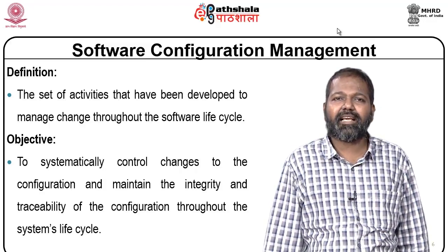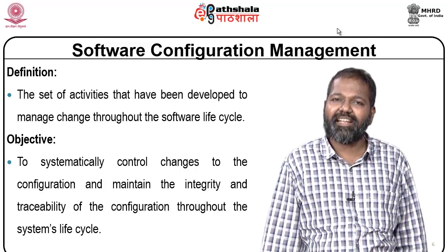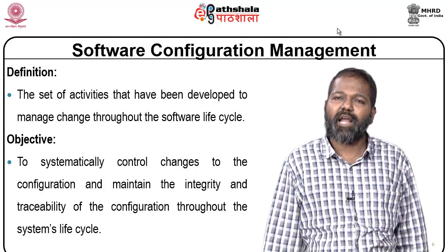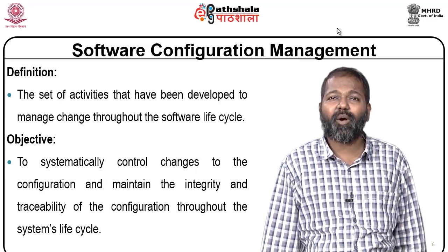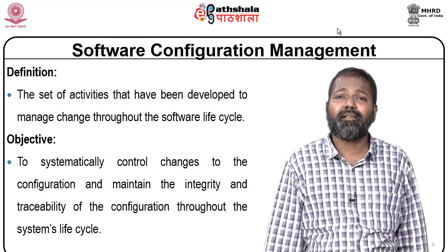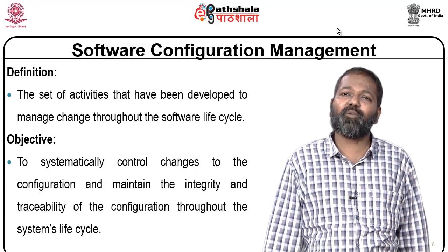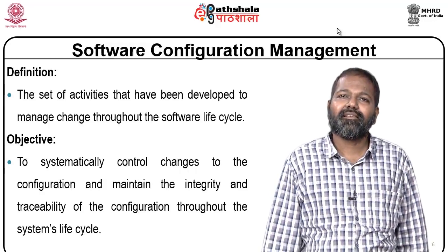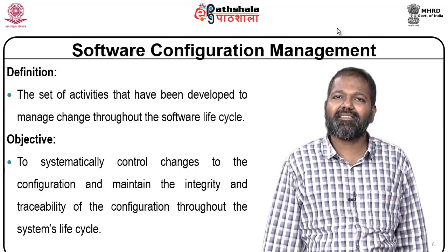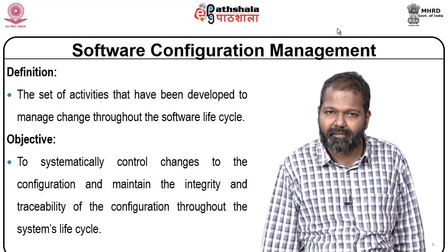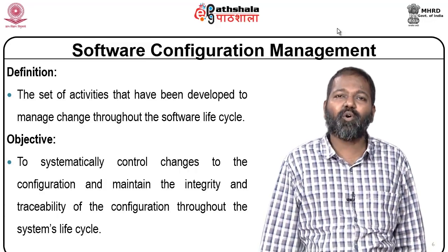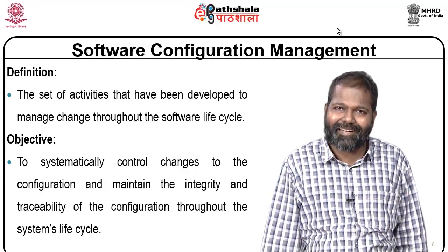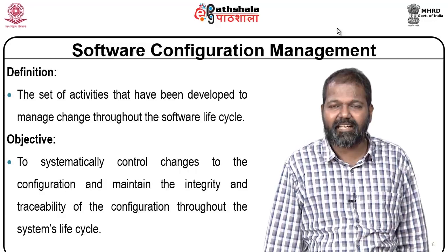You have completed the architectural design, the design has been approved, and you are in detailed design. Now when there is a change, your requirement specification document has to be modified, and your architectural design has to be modified. In case detailed design is complete and then there is a change in requirement, the changing requirement has to be incorporated in the software requirement specification document, architectural design and detailed design.